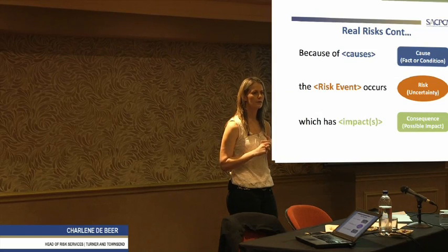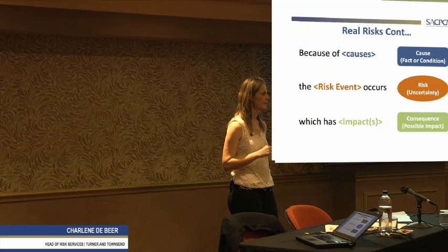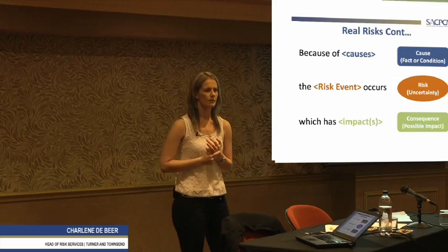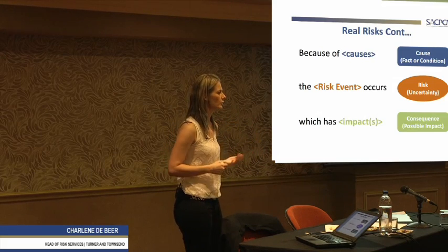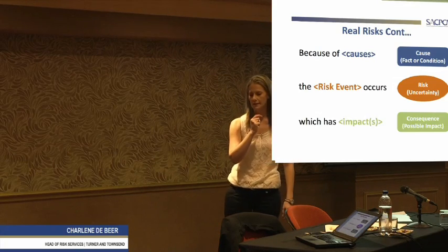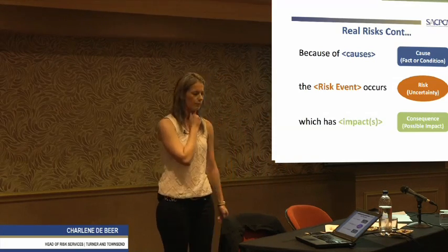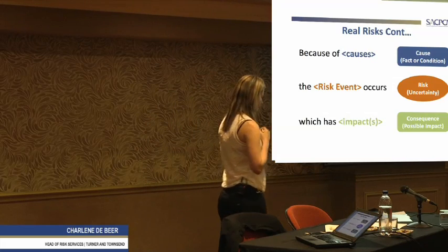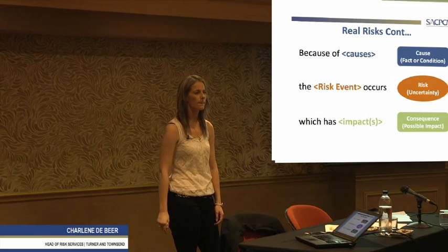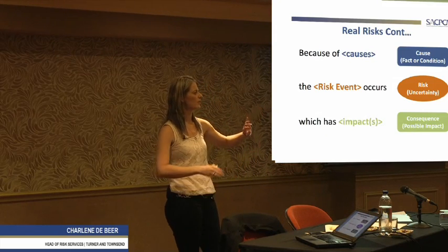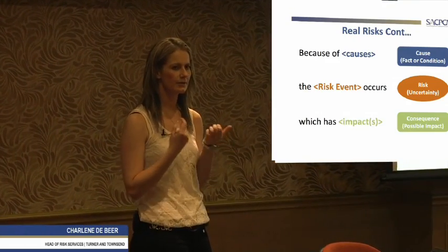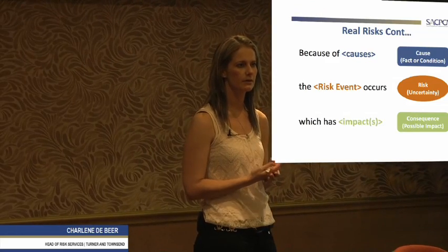And risk is also what we foresee or what we think might happen. We also identify risks from lessons learned, 100%. But if it's a new project we're doing somewhere in Africa, in the DRC, going to Congo, we've built a reclaimer for a mine there before. We know they've got political wars, guerrilla wars. We know we face a lot of country risks within Congo, for example. A lot of things we know, lessons learned, what's happened. We ask previous contractors that have worked there. We do our homework. But there is still uncertainty that we face within that environment.